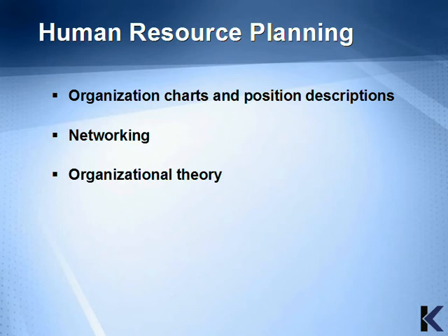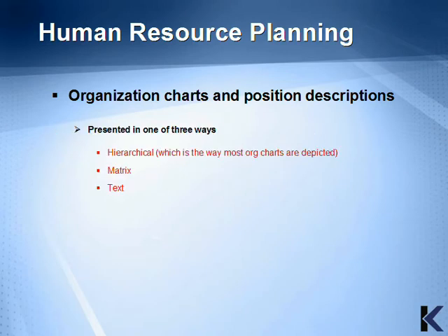In this section, we'll cover the tools and techniques of the human resource planning process. There are 3 tools and techniques for human resource planning: organization charts and position descriptions, networking, and organizational theory. Organization charts can be depicted in one of 3 ways: hierarchical, matrix, or text.